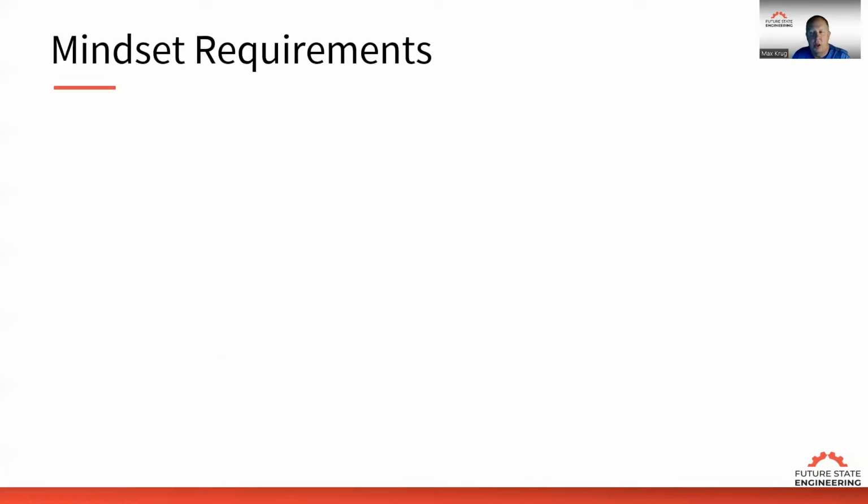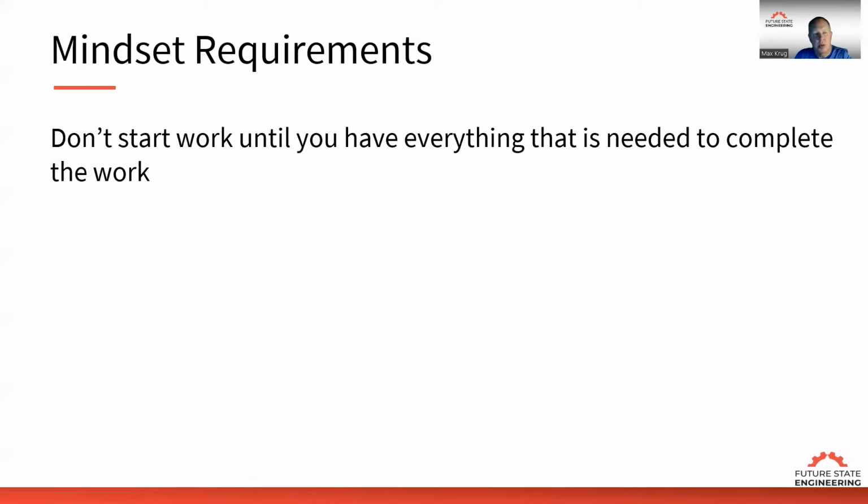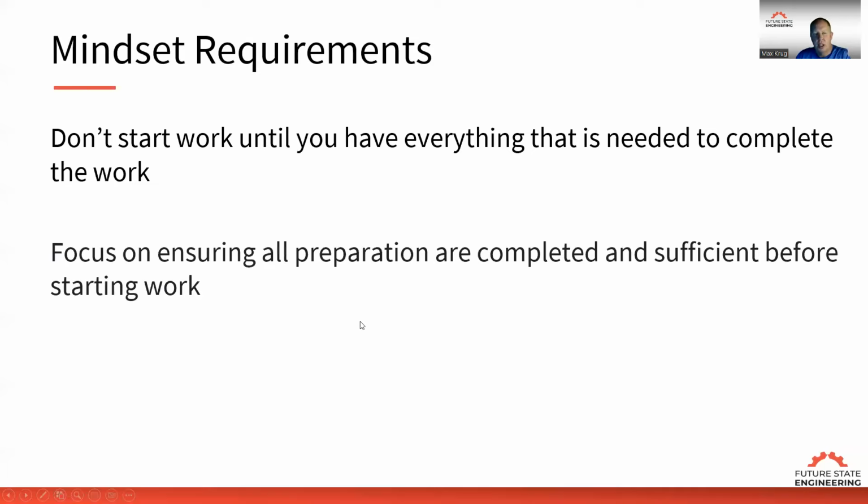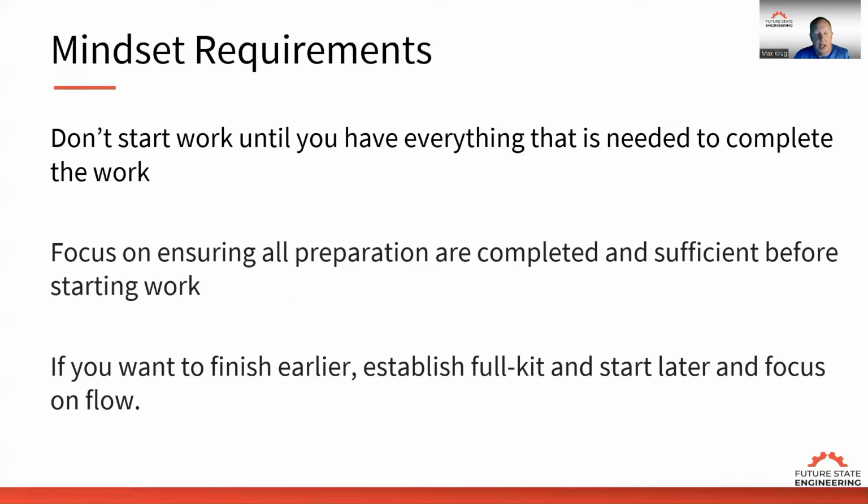So what are the mindset requirements for FullKit? First of all, don't start work until you have everything that is needed to complete the work. That's a huge change in mindset. Also, focus on ensuring that all the preparations are completed and sufficient before starting the work. Use your efforts to focus on the preparation so that when it's released, it can go start to finish in the most effective manner. And if you want to finish earlier, establish FullKit and start later and focus on flow.